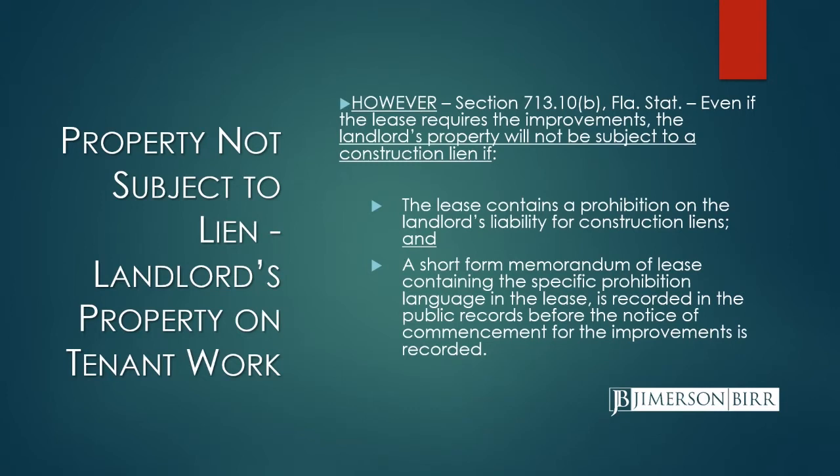That happens very often in the commercial property context. That's something commercial landlords do as a matter of course. They include this kind of language in their leases, and they make sure to record those forms. So oftentimes the contractor or subcontractor that's working on a tenant improvement project may only have lien rights as to the lease only and not as to the real property.